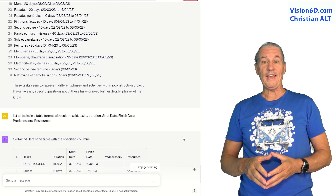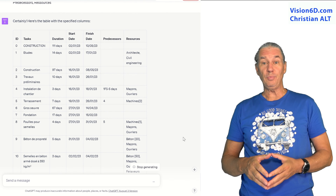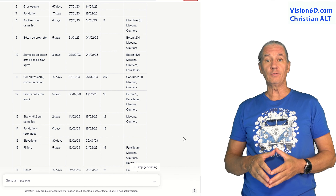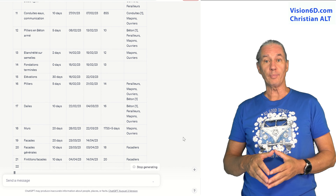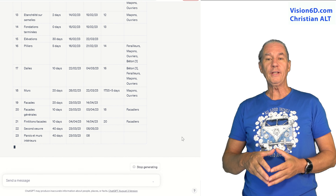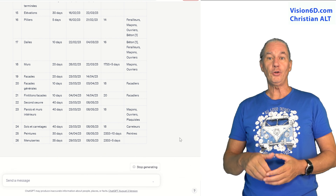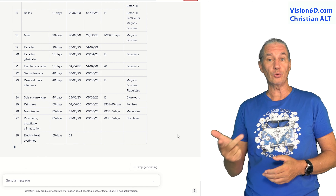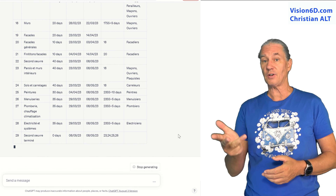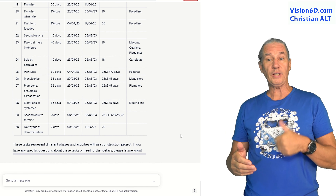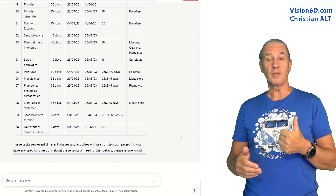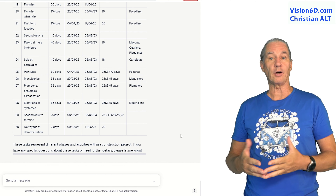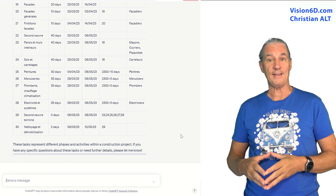In the next prompt, I ask ChatGPT to give me the information in a table format with the following columns: the unique ID, the task name, duration, start and finish date, predecessors, and also the resources that are involved for each task.